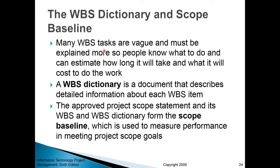Often when you create a work breakdown structure, the labels used for each task may not be clear enough for people to understand. That's why it's good practice to create a WBS dictionary — a document that describes detailed information about each WBS item. Combined with the scope statement, it forms your project definition, which also serves as a baseline against which you compare project progress.